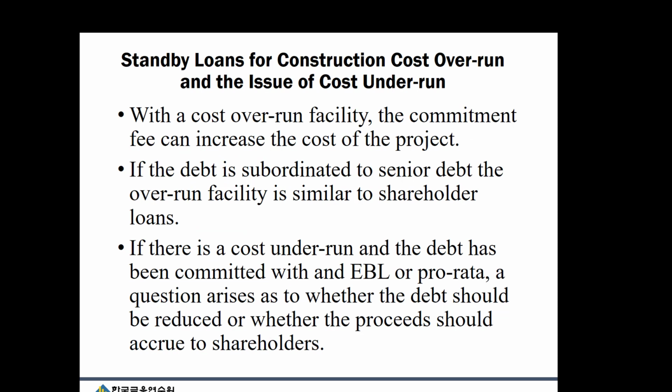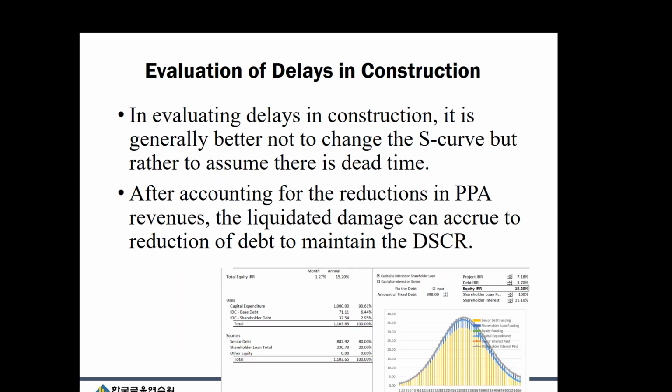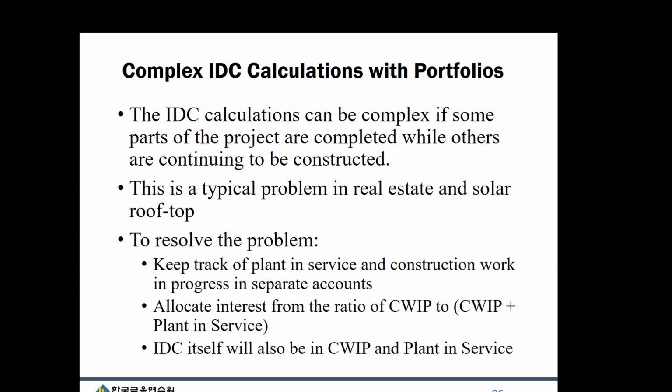That's why I hope you come to my class, because when you go through each of these, it's a whole lot better to go through each of the analyses with a simple little model. And then, what if we have a delay in construction? How do you model that? If the delay means you're going to spend money later, it doesn't hurt. But if the delay means you spend it all earlier, it makes it really bad. And how do you put the liquidated damages in there for the EPC contract?